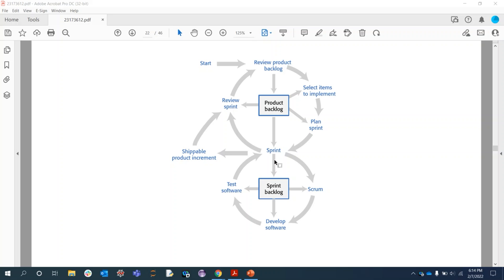During each sprint, the team will have daily meetings, such as Scrum meetings, to review the work done, and the sprint backlog is used to keep track of work that is to be done during that sprint. Sprint planning is based on the product backlog, which is a list of activities that have to be completed to finish the product being developed.